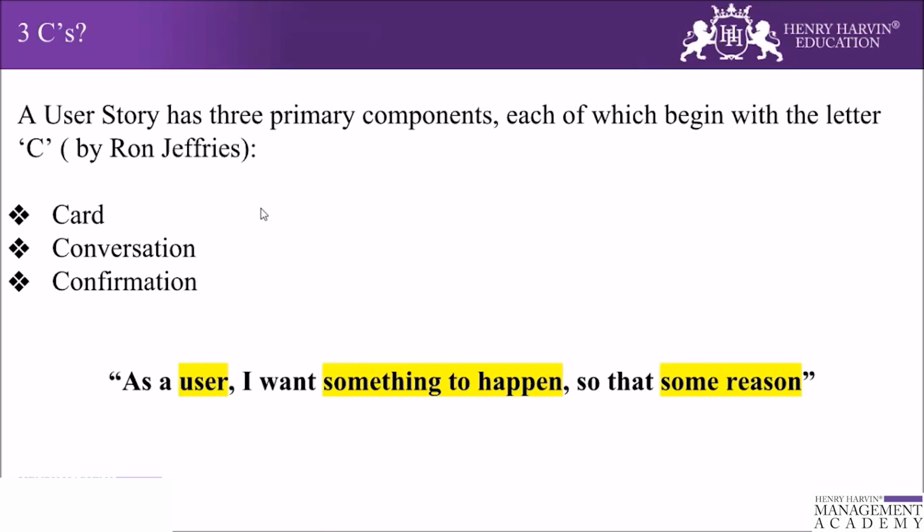So it acknowledges that the customer and the team will be discovering the underlying business system needed as they are working on it. This discovery occurs through conversation and collaboration around the user story. The card usually follows a format similar to what we have seen: as a role of the product, I can do an action so that I can obtain some benefit or value. The written text, the invitation to the conversation, must address the who (role), what (action), and why (benefit) of the story.